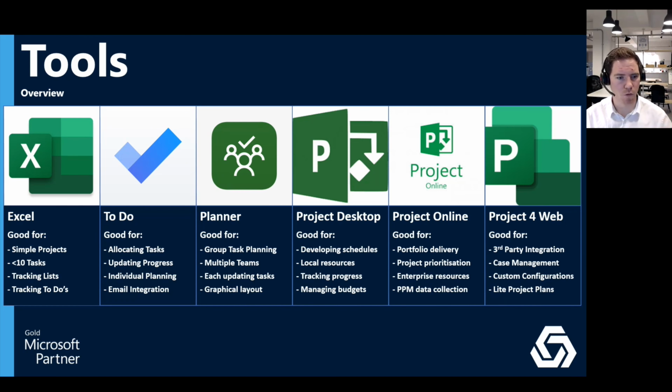So if you've got 3 or 4 people maybe manipulating a project plan in Microsoft Project, and you're getting to the point where you come in one morning and the dependencies have moved to the right, everything's got a bit messed up in your project plan because somebody's been in there last night, perhaps just fiddling and moving dependencies around, and you got that level of frustration. Then Project Online is definitely the right way of controlling and version controlling those type of things, because it's got all those controls and processes in place.